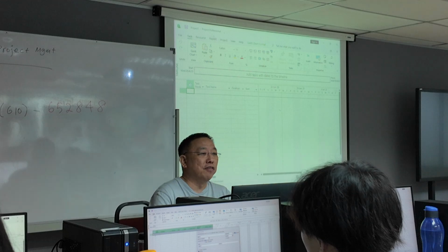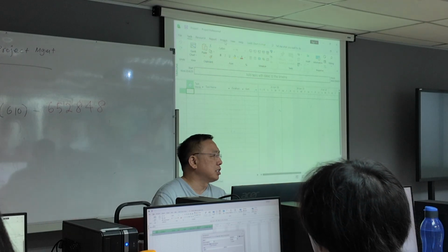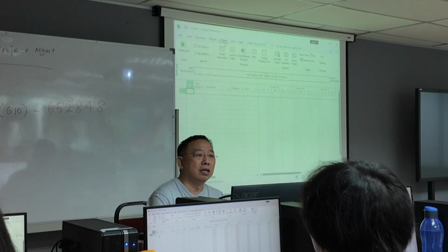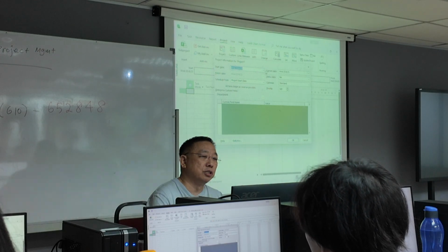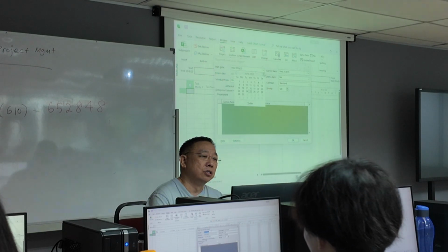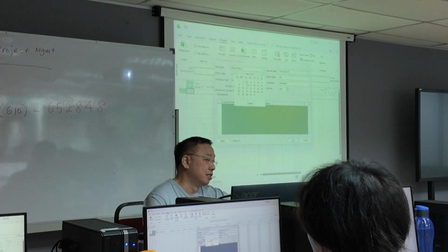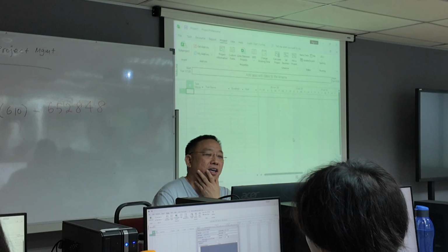One of the first things you do is set up the project by specifying when your project is starting. That's very important, right? You need to know when it starts. So you click Project and then Project Information, and the first thing you want to do is specify your start date. You can put any date in the future. I'm going to say July 1st. It's going to start in 5-6 days time. Say okay.